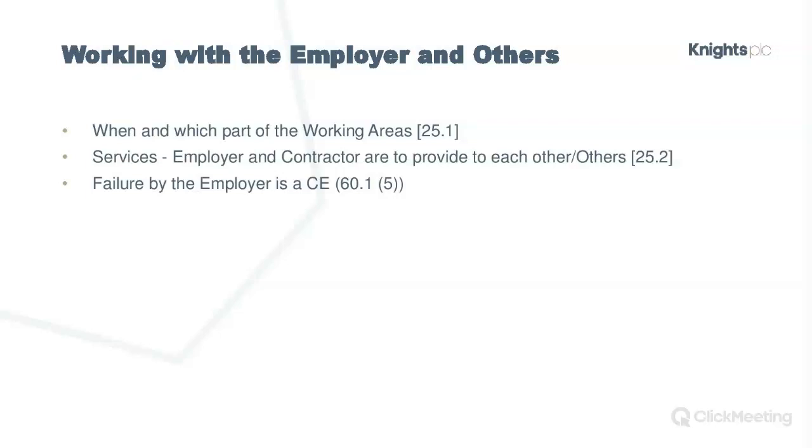NEC anticipates that the employer will have some kind of strategy so that all the parties know where each other are working and can work around each other, rather than just, well, everyone's going to be on site, so just get on with it, and contractor, you take the risk.